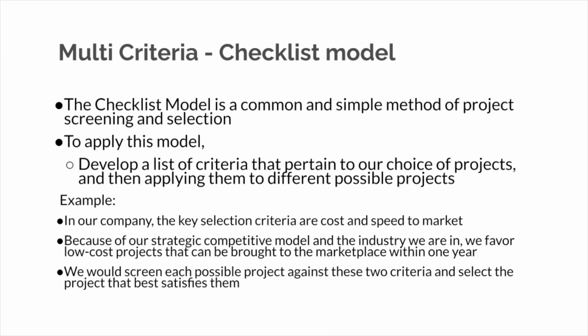We also have multi-criteria models. Checklist models, they're called. I'm going to look at a couple kinds of checklist models here. One is just a straight checklist, and the other one uses a weighted assessment. The first is the checklist model, and basically what we do is we outline the things that a project needs to achieve. And we ask ourselves, does it meet those criteria that we laid out?